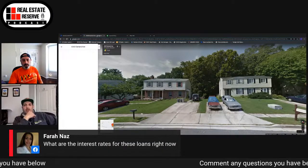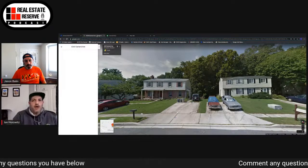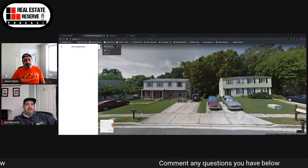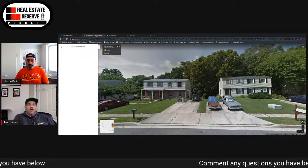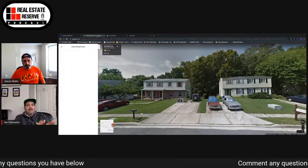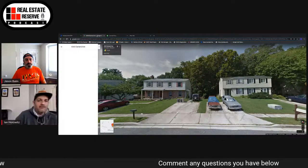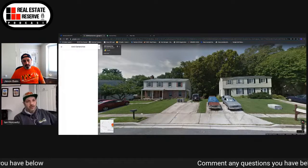So I think Dan was alluding to it the other day. I believe our budget for CapEx is $50 a month per property, but that's based on our business model. And going off what you were just discussing, it's hard enough to renovate a property vacant, let alone renovating a property for a major CapEx project with a tenant living there. And when you have downtime, like, oh, I'm going to go do the roof, I'm going to do this, I'm going to do that, well, now you're losing 3 months of valuable rent. At least when you buy it, you're not earning anything. You have this expectation that I'm going to fix everything on day one. We find a lot of investors that get in trouble are the ones that buy the property, don't renovate it on day one, try to get away with it, and just cause themselves problems over the long term.